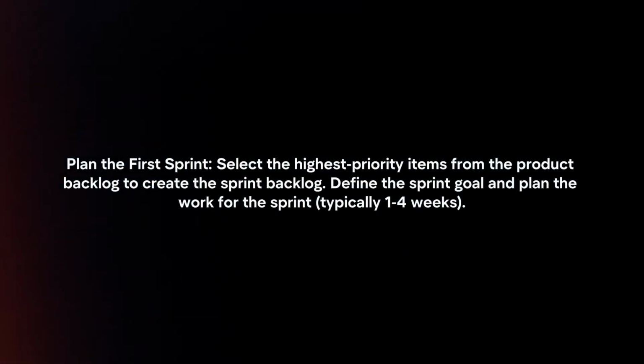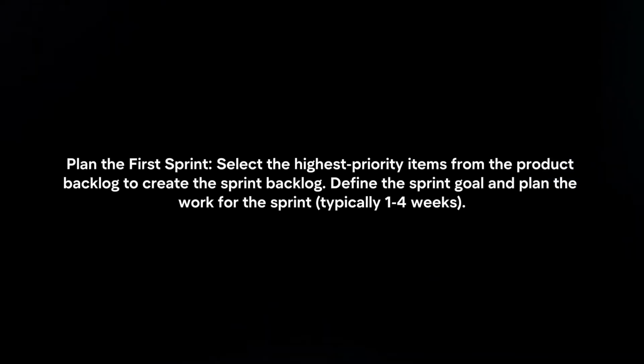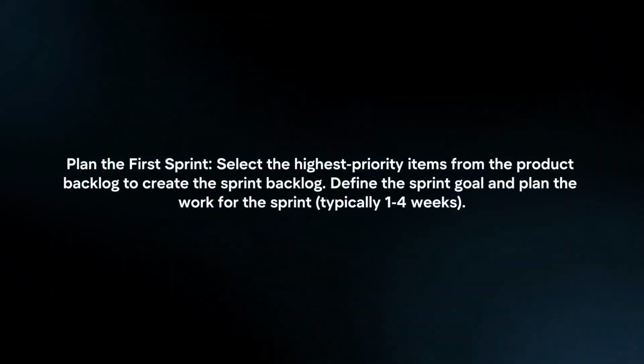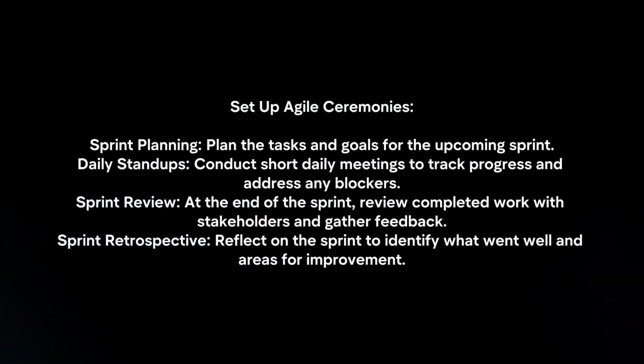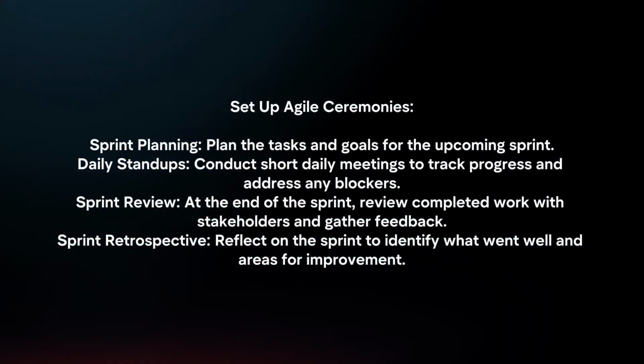Plan the first sprint. Select the highest priority items from the product backlog to create the sprint backlog. Define the sprint goal and plan the work for the sprint. Set up Agile ceremonies. Sprint planning. Plan the tasks and goals for the upcoming sprint.